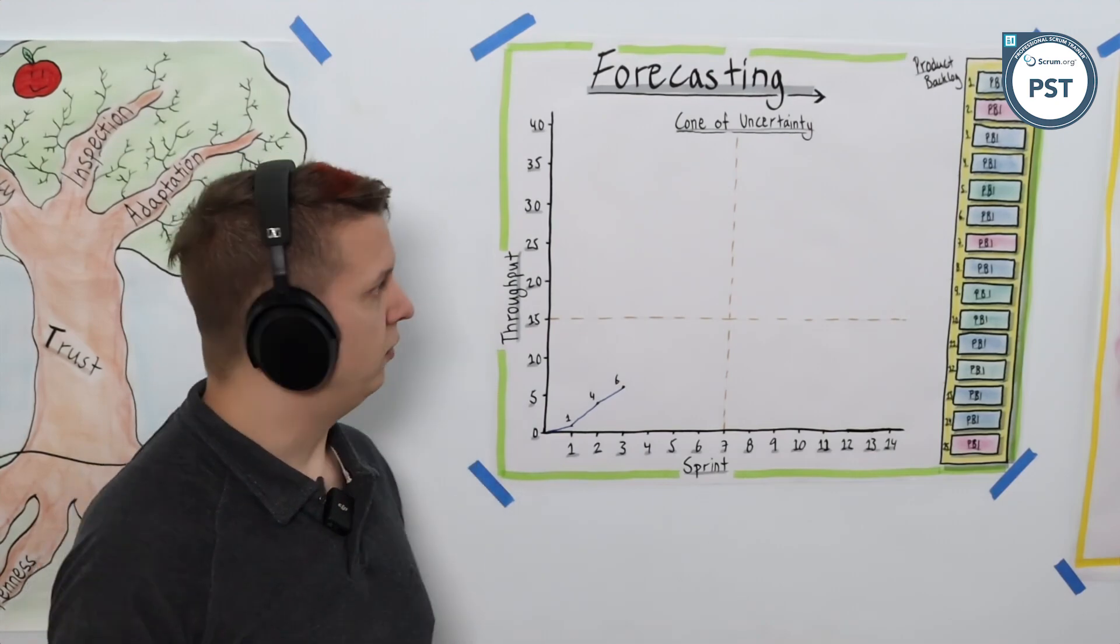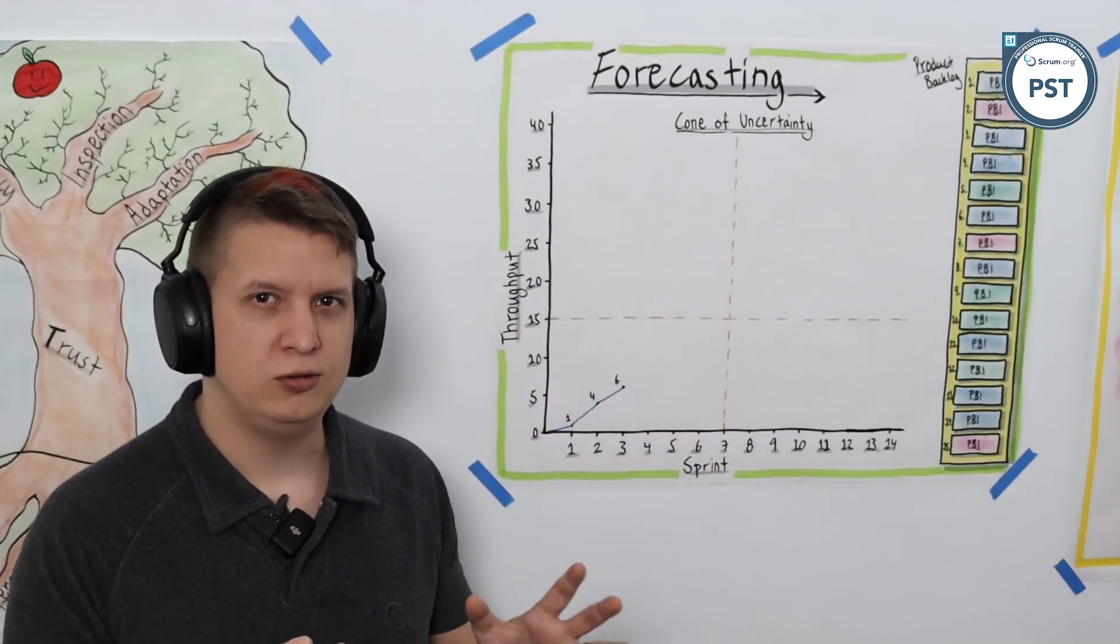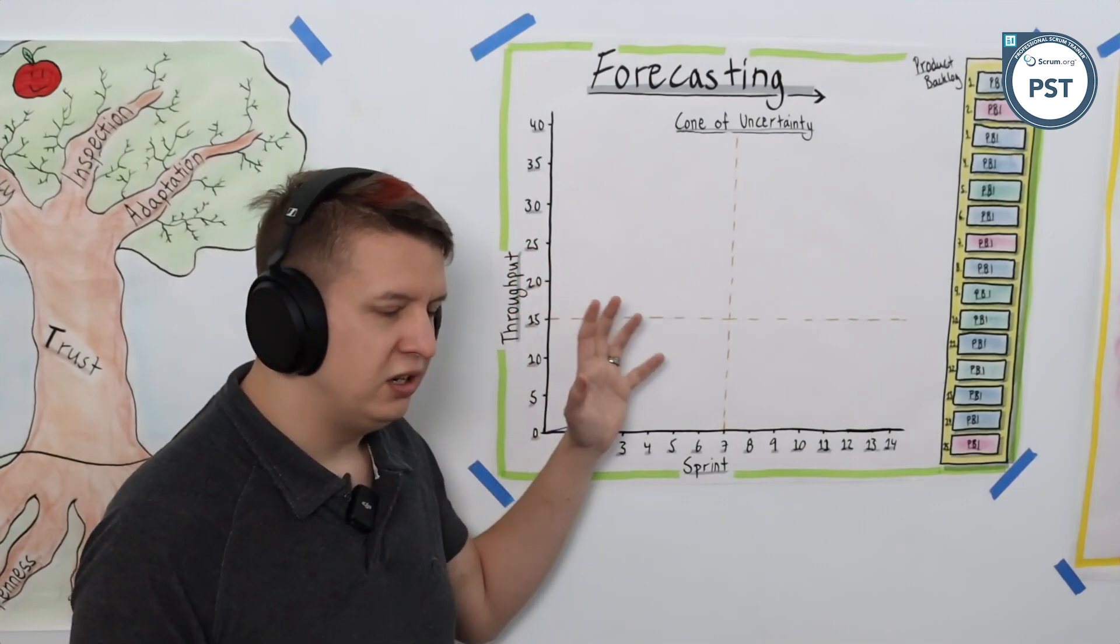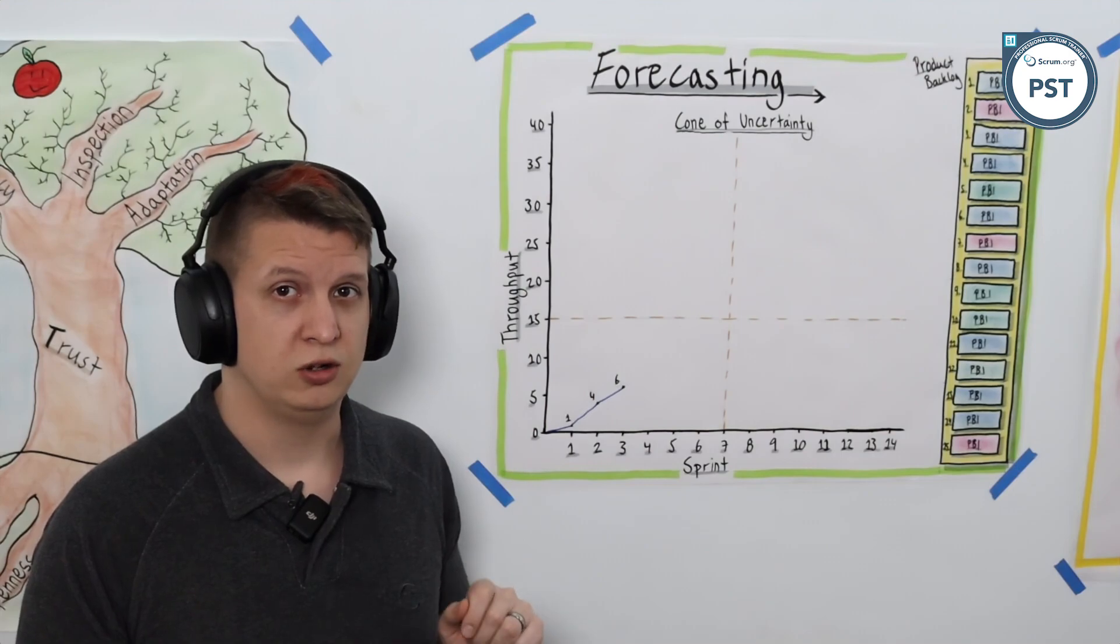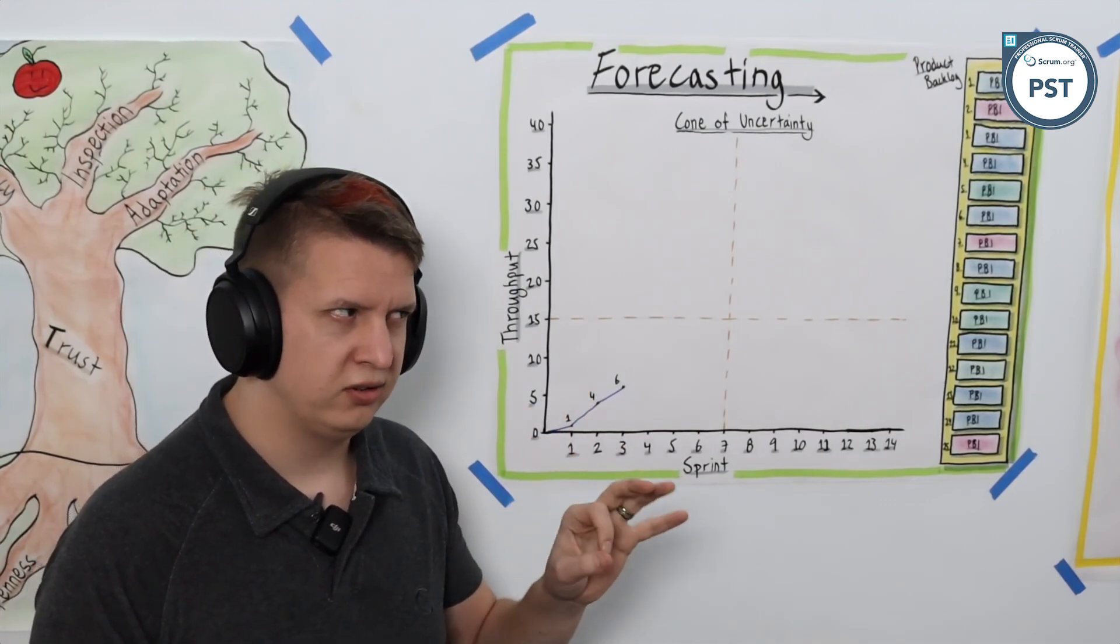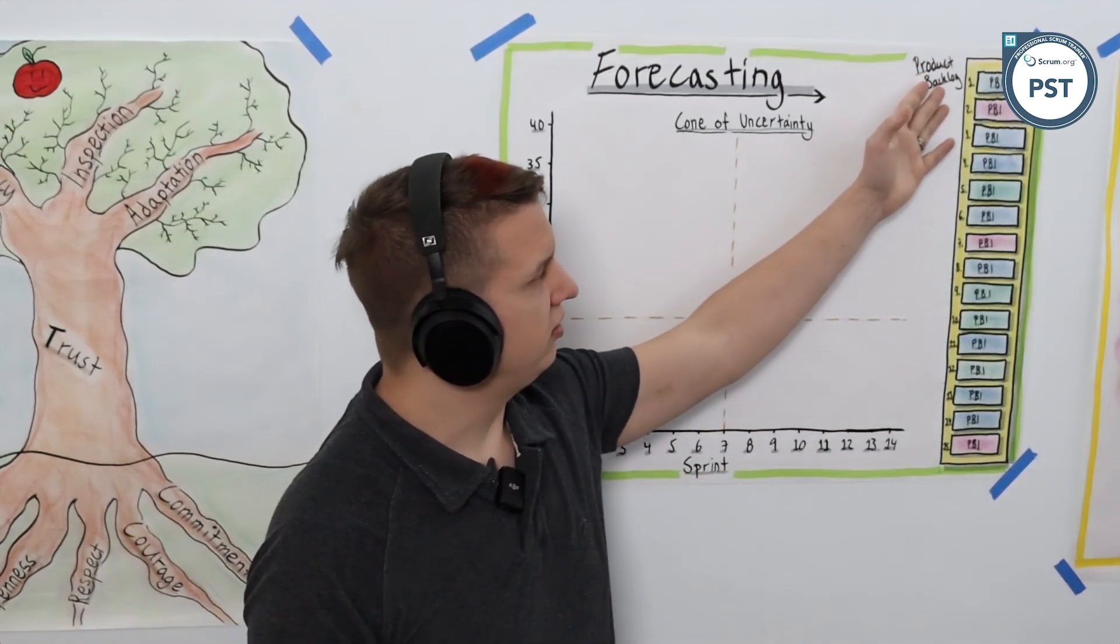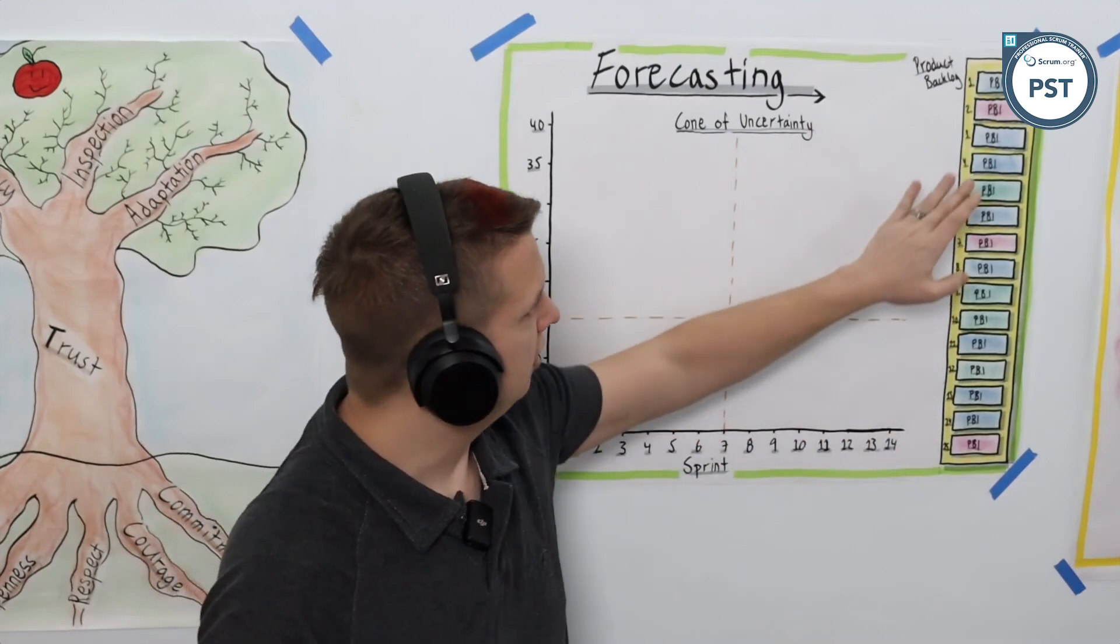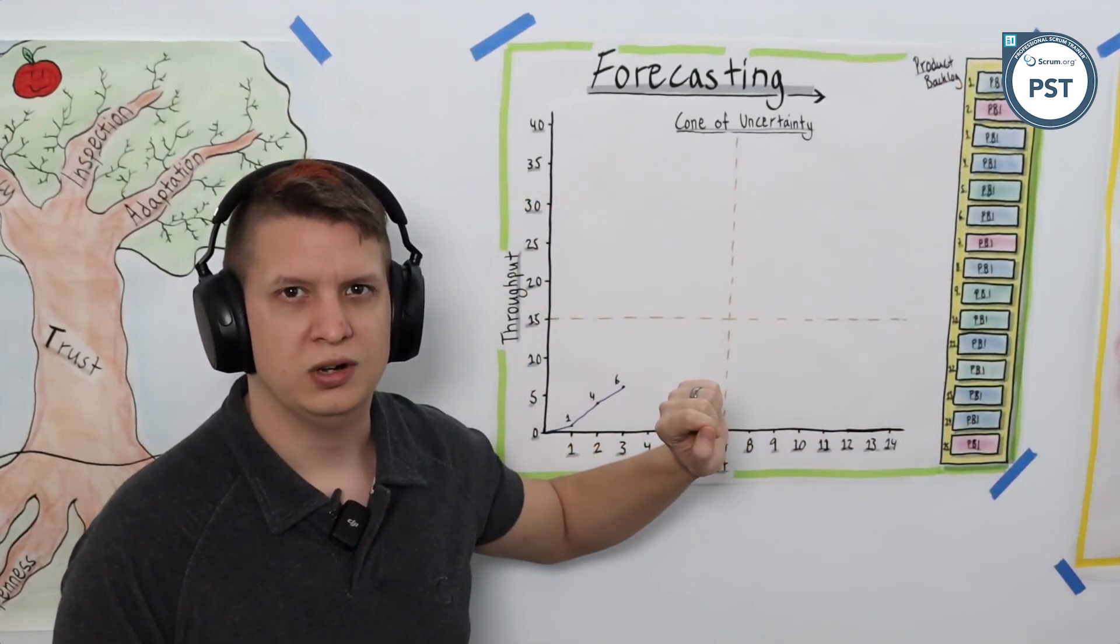We don't worry about the sizes, we just worry about the number of items. We're going to use something called the one-two-three visual that I created and use in all of my trainings. It's a very easy, simple way of sharing how easy it is to get started with forecasting and the cone of uncertainty. To help us along with how this translates to your product backlog refinement and talking to your stakeholders, we have our example product backlog here numbered 1 through 15.